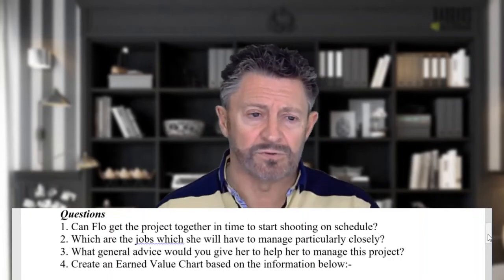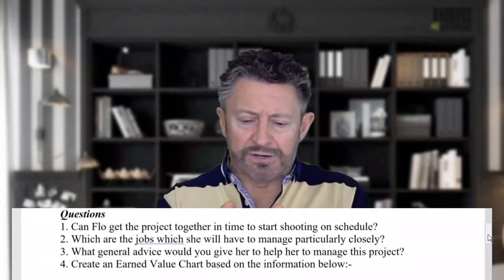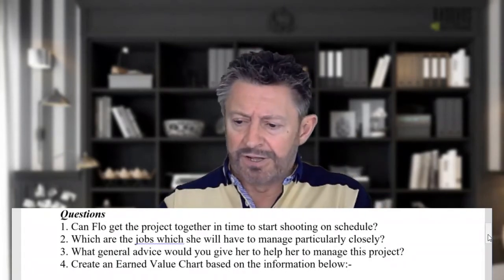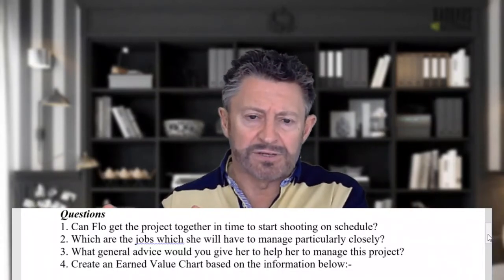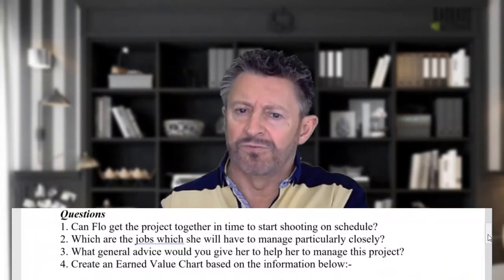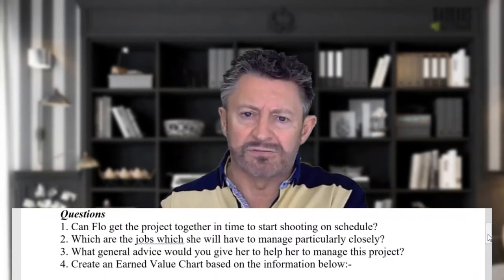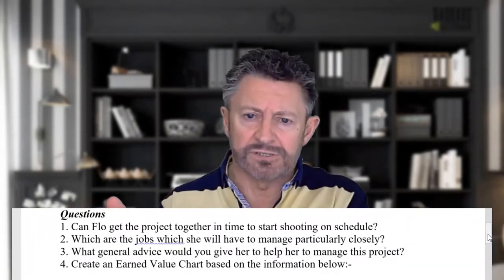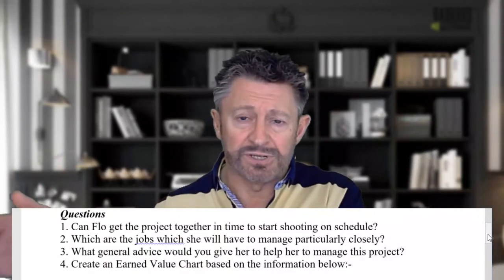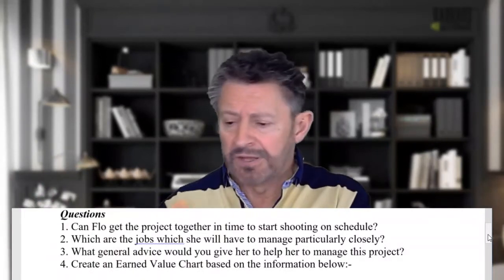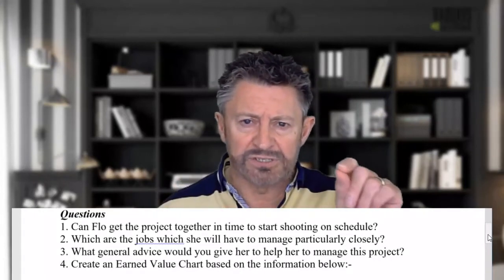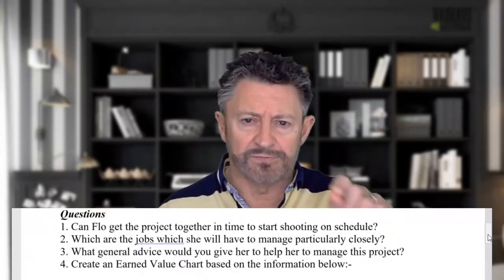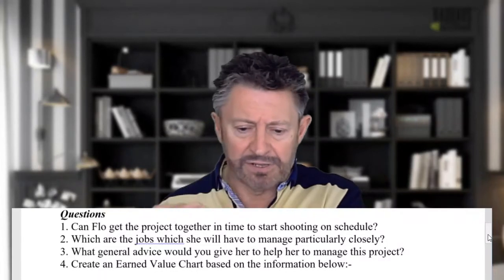Okay, so when you define, well, this has to be done first before we can do that, then that has to be done before we can do that, and that has to be done. And if there's a slippage, so if the computer designers come back and say, sorry, it's not 4 weeks, it's going to take 5 weeks because we're upgrading our systems, that pushes out your close date. So work out all of those things that are precisely on the critical path that has to be done first, then second, and then third.